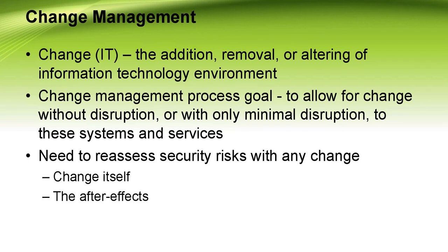This highlights one of the most important aspects of change management related to risk management. Any changes to a process or system potentially incur additional risk. This is why, for example, patching a system is first tested in a lab before production deployment. Have you ever patched your own personal systems or even installed new software that subsequently created problems?